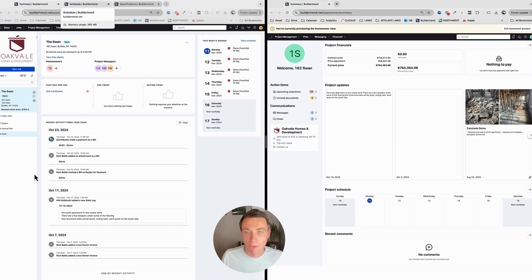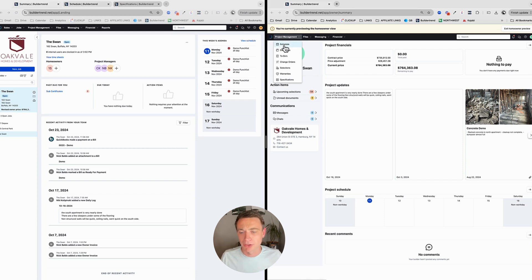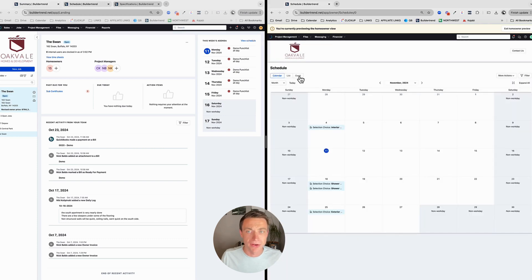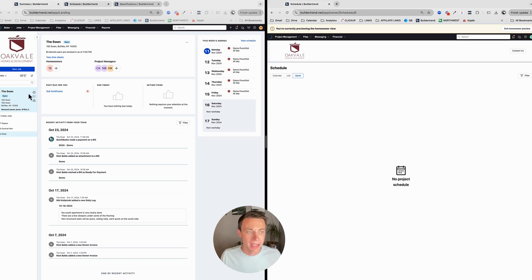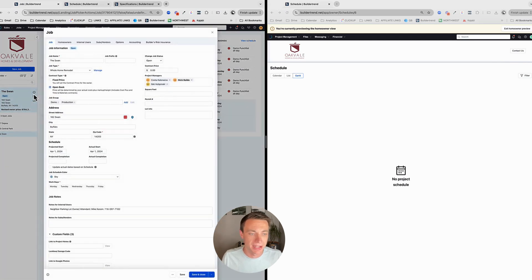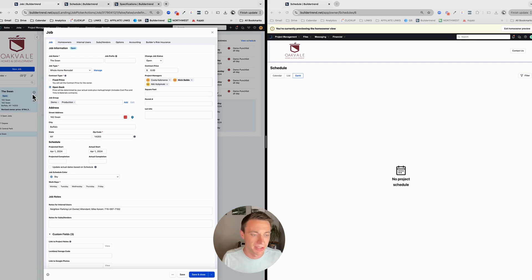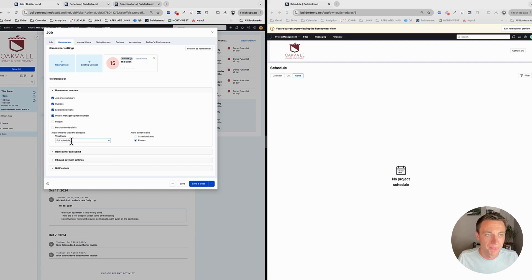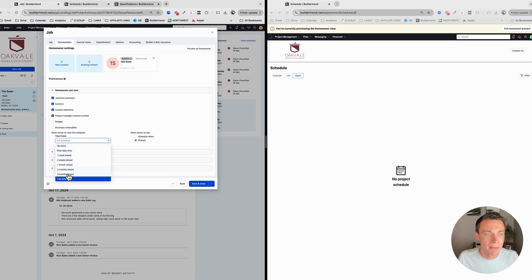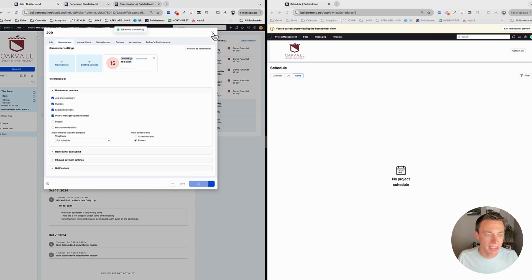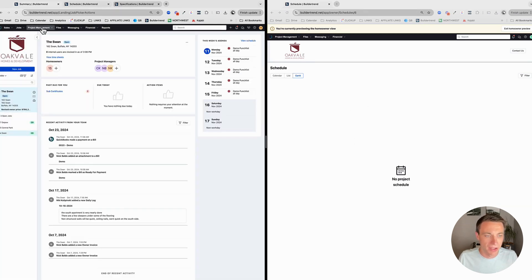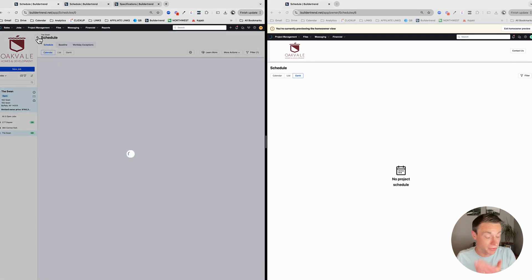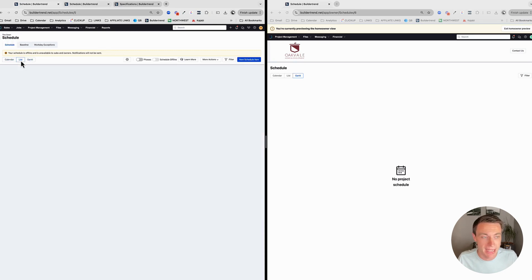First, I want to talk about a schedule. A very common issue is that we get a customer who's all excited about BuilderTrend. We've done the hard work of convincing them to log in and create their username and then they go to BuilderTrend and they see a schedule and it's completely blank. This is very common and this can happen for two specific reasons. The first is that we haven't given the homeowner access to the schedule at all. We probably should. I find that this is very useful to give my customers access to the schedule. If I go to my Homeowners tab under Job Info here, I'm able to indicate whether or not they can see the full schedule or not.